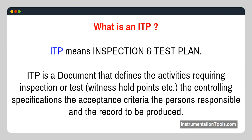What is an ITP? ITP means inspection and test plan. ITP is a document that defines the activities requiring inspection or test, witness and hold points, the controlling specifications, the acceptance criteria, the persons responsible, and the records to be produced.